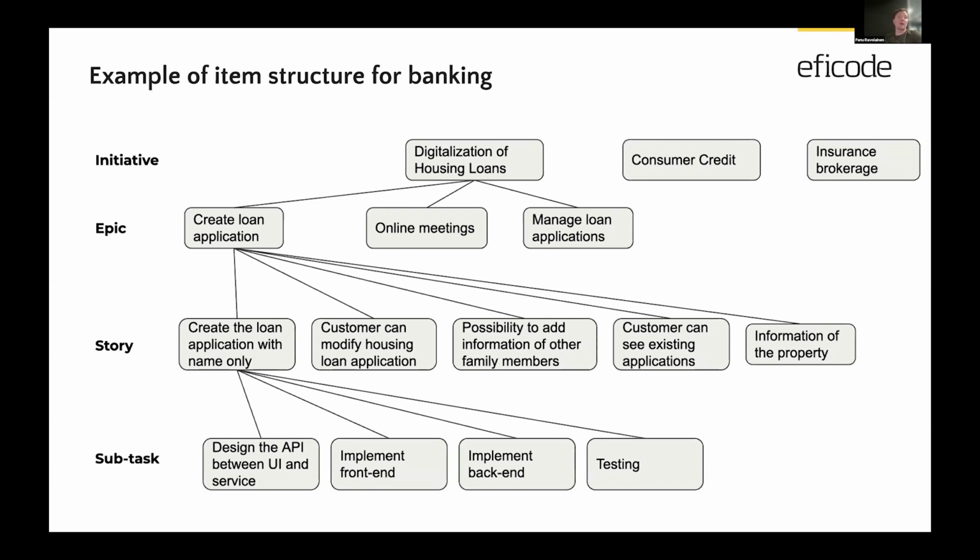One problem is that what we currently have as subtasks here, if those become visible on the backlog at the story level, then discussion about those stories and tasks becomes very difficult with the stakeholders. Prioritization can be impossible because, well, you will need both front end and back end, for example, for the functionality to make any sense. Exactly.